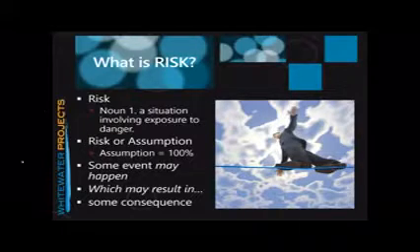Yes, here's the definition of a risk written down right here. It's a noun, a situation involving exposure to danger. A risk or assumption is something that has, an assumption has 100% probability. And then here are the 3 parts of a risk statement: some event that may happen, which may result in some consequence.